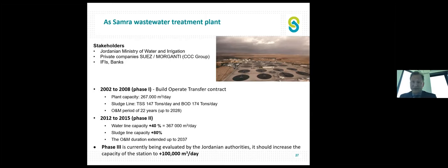We and our partners, CCC and Morganti, the Lebanese group, won the tender to perform the BOT over 25 years, with a 3-year construction period and a 22-year operations and maintenance period.